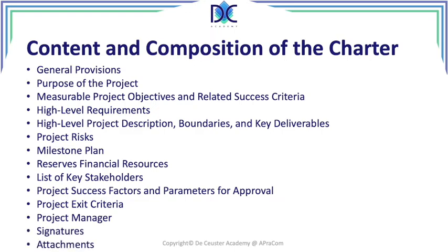The document is typically limited. The description is high level, to avoid that the management has to deal with special technological definitions and principles that may not be understood by them. It can be very specific, or it can be general about the project, what you are doing. So in some cases, the technical aspects have to be avoided in the charter. They can be in the attachments, and we can put a lot of additional information in the attachments.